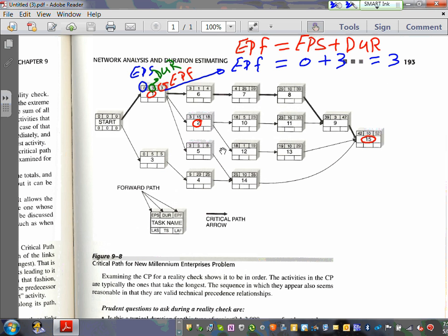Duration of 3 weeks. If it starts at week 0, right at the beginning, guys, and it needs 3 weeks to finish, Derek, then you can tell the earliest possible finish for this activity is actually 3, right? Because you take the 0 plus 3 equals 3. That's how they assign these kind of magic numbers that you're looking at. I'm going to take one more activity, Adam.